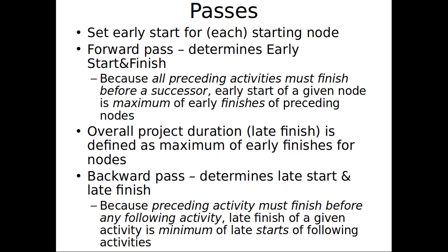And specifically, how are we going to compute the late finish? It's going to be the minimum, ladies and gentlemen, the minimum of the late starts of the following activities.